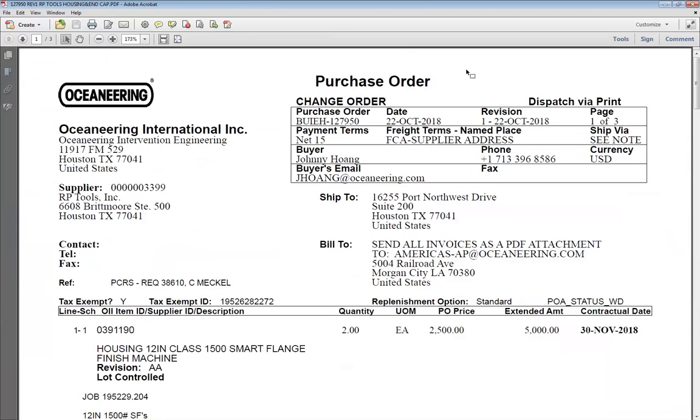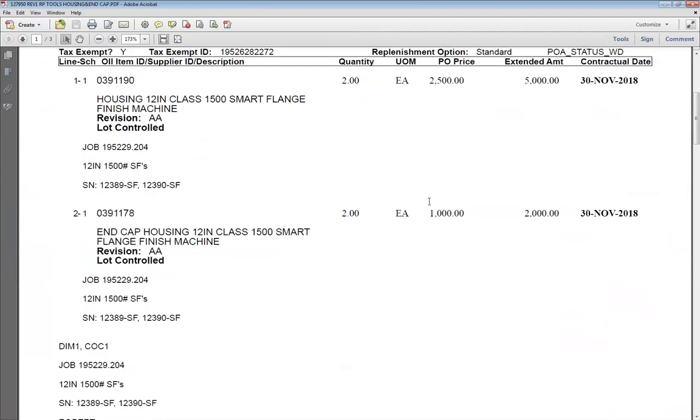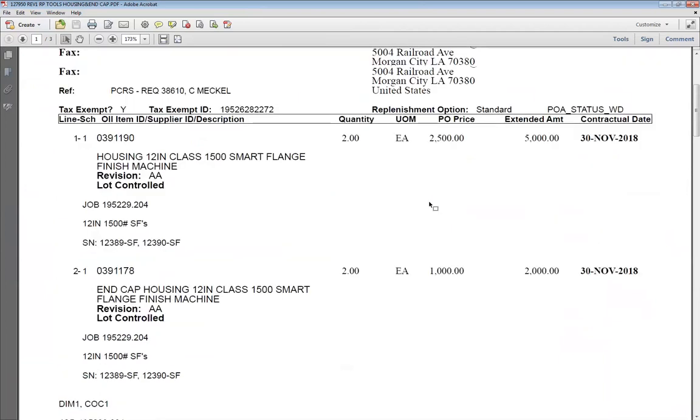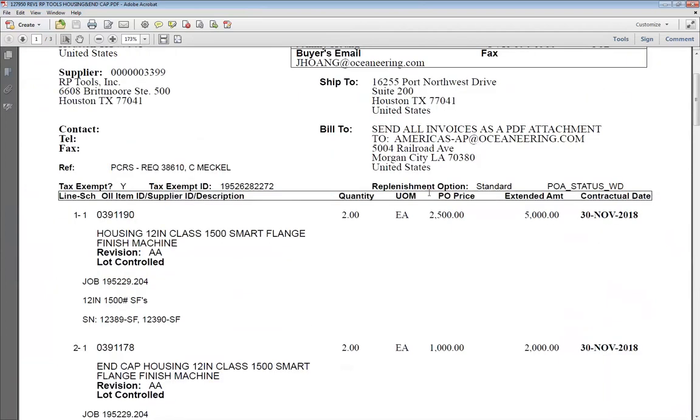We also have purchase price variance in our PeopleSoft. If you have bought that part before and they try to order it, it will show them the purchase price variance. You bought this before for $40, you're paying $43. It's an indication for them that they're overpaying for this part. We don't use that feature efficiently, but that's what the PO will be. It will have the rec number, the PC's name, and what parts were there.